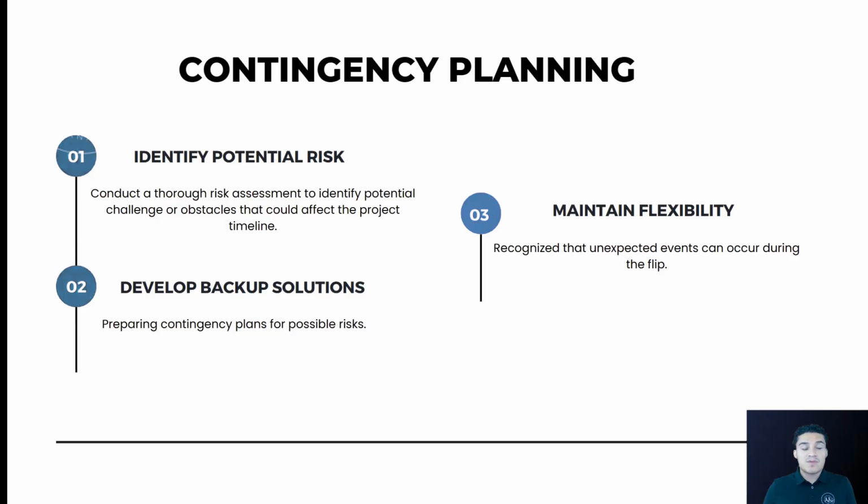But now something unexpected happened. You have to put $5,000 additional into the property. Guess what? You already had that math on there. It was implemented. Instead of making an additional $20,000 in gains, now it's going to be $15,000. But so what? At least you're going to make money. At least you're going to be able to make a good amount of money to repeat the process and do it again. So all of these things are extremely important, and you need to be able to implement them.